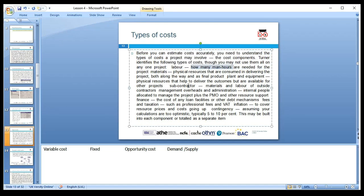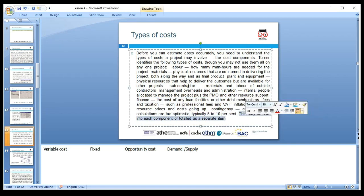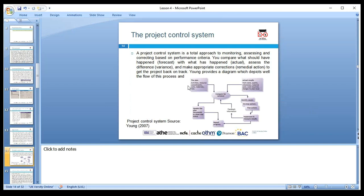You have to identify the types of costs — you may use them all in one project. Labor: how many man-hours will be needed for the project? Materials: how much is required? Physical resources, all of this. You need to think about tangible and intangible costs, VAT, inflation, and have a contingency plan — you can look at 5 to 10% more. You need to make sure there is spare cash, possibly building in 10% for inflation. If you need to hand over a building or construction project, make sure you fulfill all requirements because there can be damages if you don't.